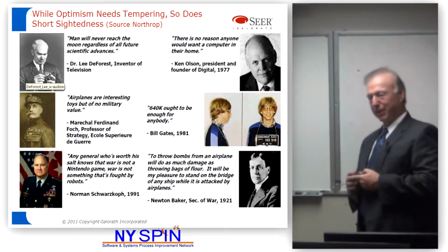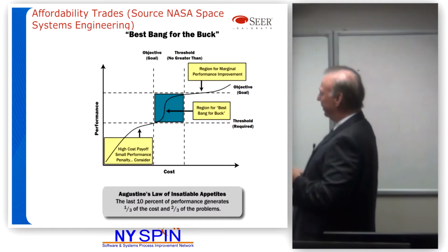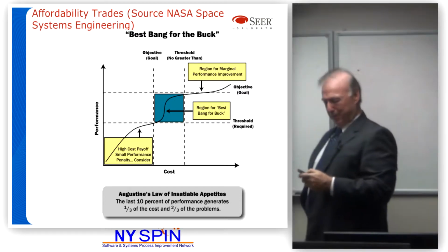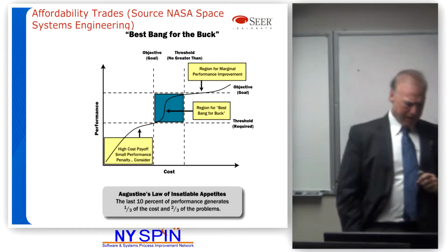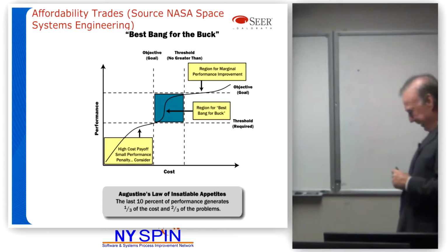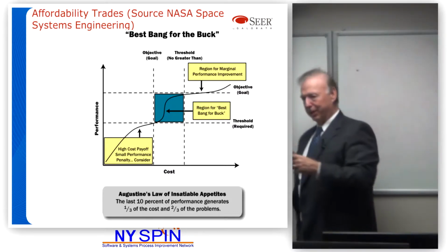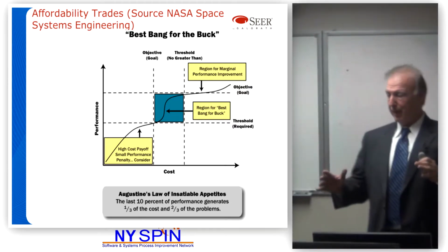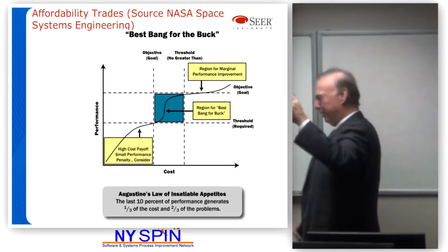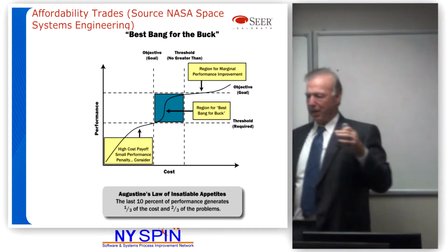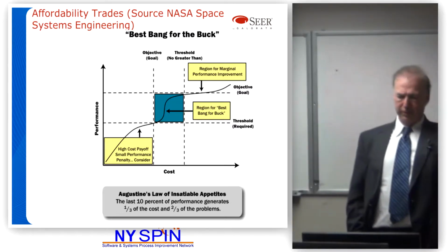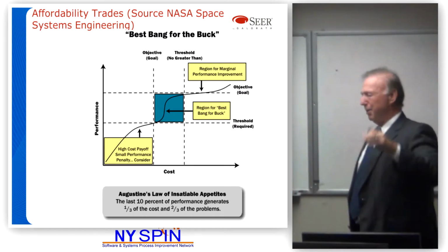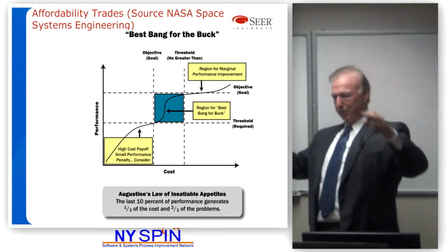Anyway, figures of merit can be interesting. Again, looking at NASA. NASA figures out where they can get the best bang for the buck using the figures of merit. What a figure of merit means, it might be better off paying 30% more cost to get 50% more functionality. Or to knock 10% of the cost off and lose 30% of the functionality. It's not that obvious just to say the lowest cost is the best thing. Looking again at unmanned aircraft, UAVs, we did an analysis several years ago that showed that rather than building the most efficient UAV, they could cover more area for, I forget, even half the cost or something, by building cheaper, not as powerful UAVs and using more of them.